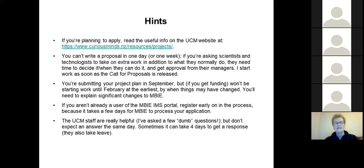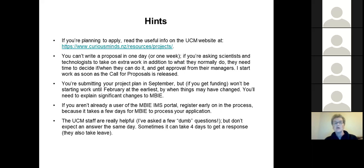You can't write a proposal in one day or one week. Last year someone contacted me the day before proposals were due asking for guidance and I said no, because it's impossible to do in one day. If you're asking scientists and technologists to take on extra work, they need time to decide if they're available, when during the year they can do it, and they have to get approval from their managers — that can take quite a few weeks. I start working on my proposal as soon as the call is released, and I've already started on this year's even though the portal doesn't open till tomorrow.